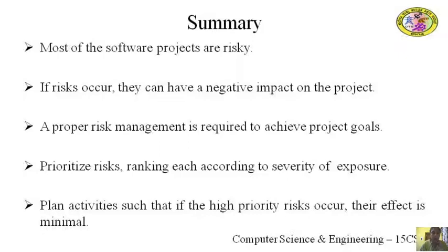Always be forward thinking about risk management. Otherwise, the project team will be driven from one crisis to the next. Use checklists and compare with similar previous projects. Prioritize risks, ranking each according to the severity of exposure. Develop a top 10 or top 20 risk list for your project.